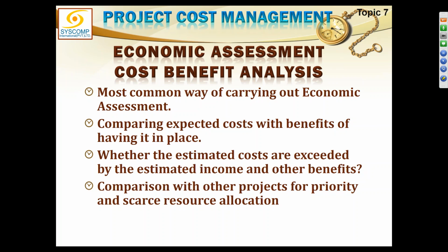So all the benefits which are ever going to be yielded out of this project all have to be considered in the cost benefit analysis, and they have to be tabulated in the form of money. The benefits have to be translated into dollars. Only then can you compare them with the investment, and ultimately you know whether you have more benefits than the costs or not. If you have more benefits, then it is economically feasible.